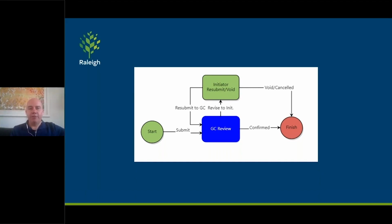And then at the end of the month, each of these daily reports is pulling from the commitment, and it's done automatically. All the calculations are automatic, but at the end of the month, then we can cut the check to the vendor. But we do that out of our PeopleSoft system, and there's somewhat of a manual handoff at that point, but we're talking about possibly integrating that in the future.